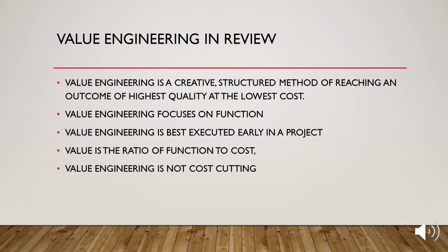Now, just to go over a few of the major points from this value engineering lecture. Value engineering is a creative, structured method of reaching an outcome of the highest quality at the lowest cost. Value engineering focuses on function, basic function, the purpose of a project or a product. Value engineering is best executed early in the project where it can have the highest impact on cost savings. Value is the ratio of function to cost, or more broadly, the satisfaction of needs compared to the use of resources. And again, value engineering is not cost cutting. It is not a cost comparison.